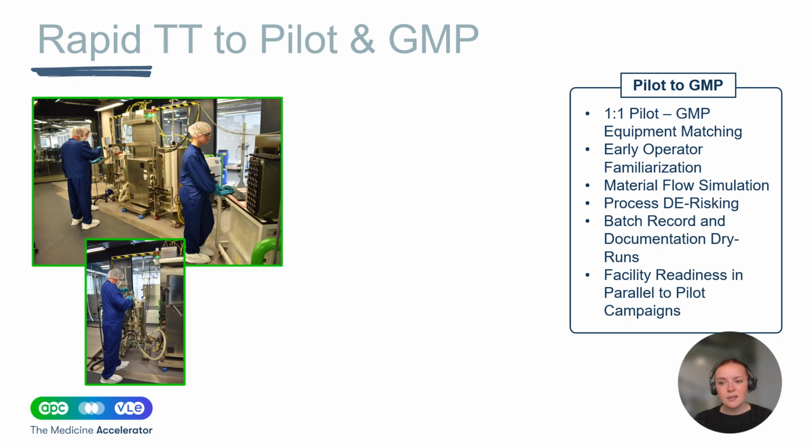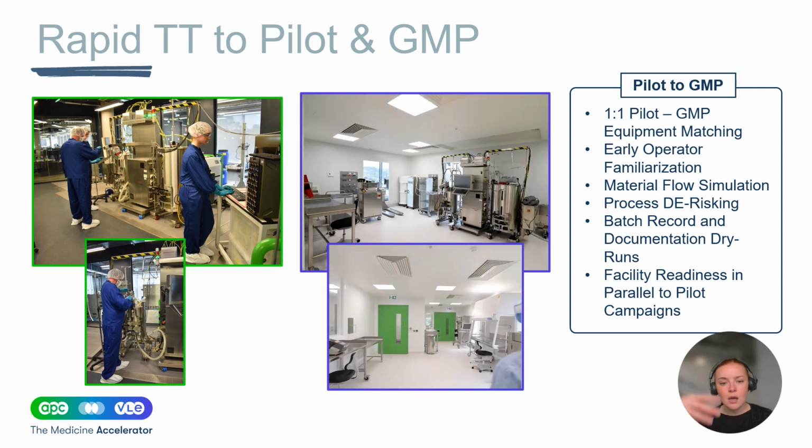And the biggest speed-up in all of this was that while we were still developing and running this process in our PD labs, we were actually getting the VLE suite ready. Because we knew what the process was going to be, and what we were scaling up, and because we already had the equipment in the MSAT lab, we were able to get the facility ready for VLE during those pilot campaigns because we knew there would be minimal changes.